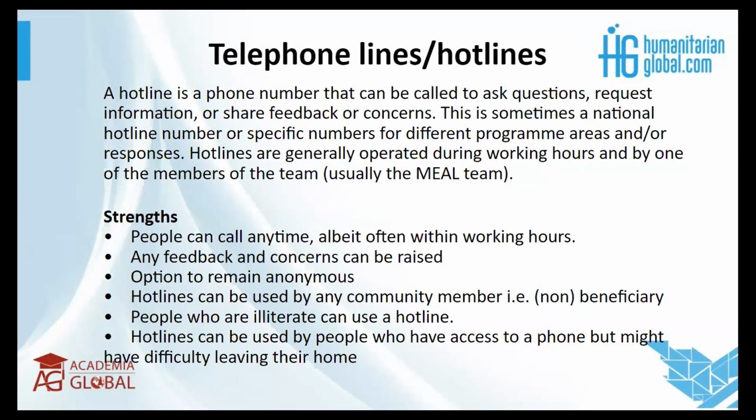But then on the other hand, it also depends on the resources of the project for them to be able to get a phone number and also a dedicated human resources person to be able to stand by and be there to take the calls, because there are times when this hotline is supposed to be open 24/7. So that means you need to make sure that there's the human resource personnel who are there to record those complaints, and they are also able to put it down, whether it's in a data entry system, and make sure this is also fed to the persons who are supposed to respond to the complaints or the feedback.